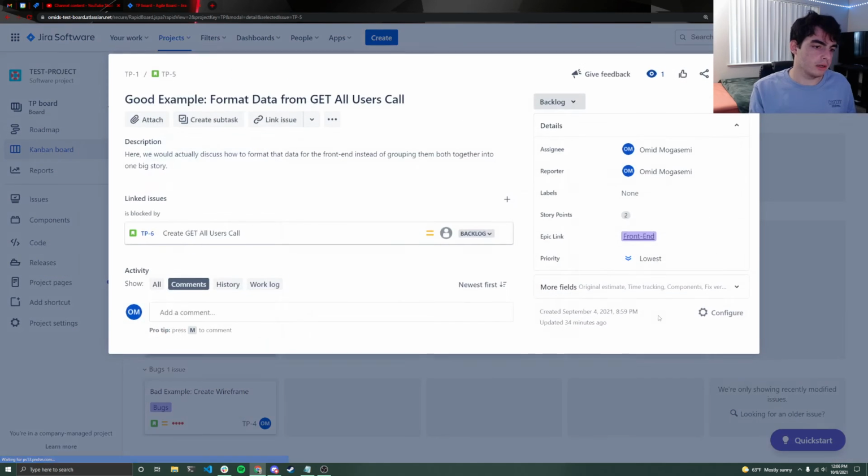And also, sorry for clicking off this, for the story point value, something to keep in mind when you're creating it is you should be taking everything into account. You shouldn't just say, oh yeah, this code, I think it'll take me an hour to write, because I'm a pretty experienced developer and I know this tech stack. I'm guilty of this all the time. Something that people often forget is the research and code cleanup that need to be taken into account.